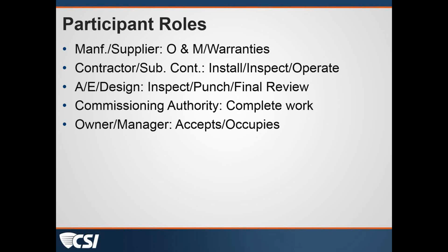And if it doesn't, then I mark that up and send it back with the submittal, so that when they provide that warranty at the end of the job, it's correct and we're not going through that process, which could further stretch out this closeout process. So if they know up front, I asked for a 5-year warranty, I want a 5-year warranty, don't submit me a 1-year warranty at the end of the job, it can kind of help that process speed up a little bit.